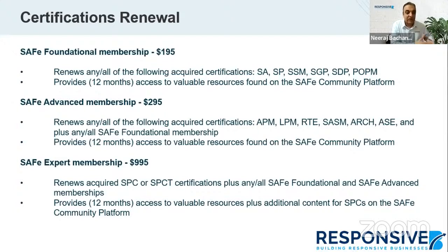And that is where the concept of objectives and key results was introduced, which means the portfolio or the organization can know, in this quarter or maybe two quarters or the entire year, what are the market goals, the customer goals, the competition-beating goals that we are trying to achieve, and these will be used as part of the OKR. Please also keep in mind that OKRs can be further broken down to value stream KPIs, which means each value stream has identified its key performance indicator, be it improving the net promoter score or the customer satisfaction or increasing the shareholder wealth, whatever the KPI may be.